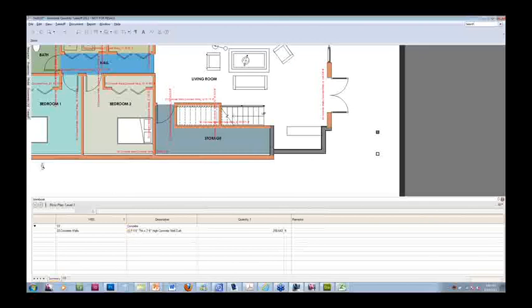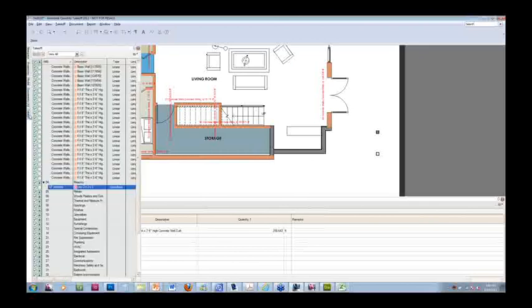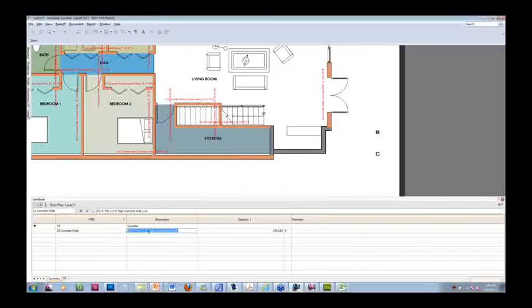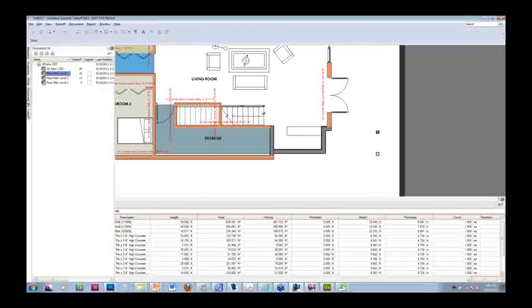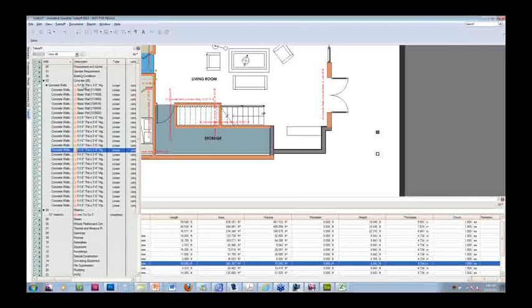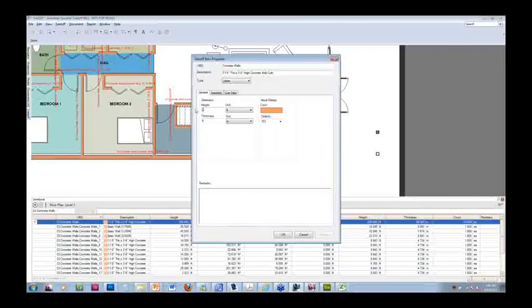Anyway, once I have this, and by the way, I forgot to add the most important thing: if it is 2D, you have to make sure that you add the information about the object. It means you have to add how tall, like the height, and the depth and so forth. I don't know if you remember what I said earlier. If you have this information, here, let me go back to what I was doing. You can type in the height and the thickness.